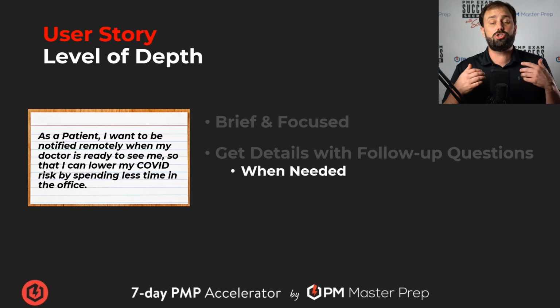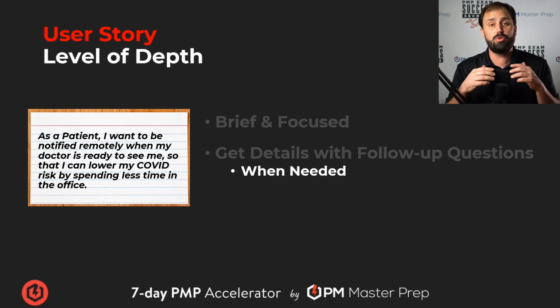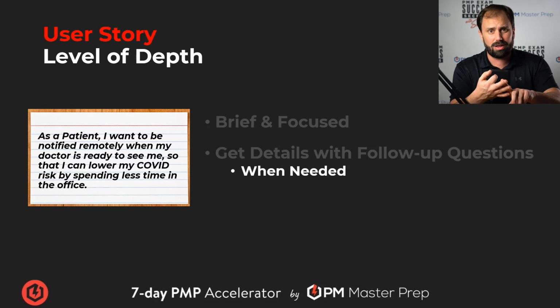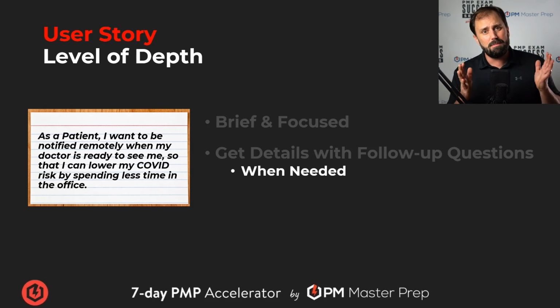So that's when it's judicious to spend our time and our team's time to go through that, ask the questions, refine them down, get them to a point where they have good understanding, we've been estimating them, and we're ready to work them. We can actually work them. And we don't waste our time on the things that we might not deliver or might not do for months or years or ever. So we are going to prioritize the things at the top. We're going to be managing our backlog. That's called backlog refinement. Next video.